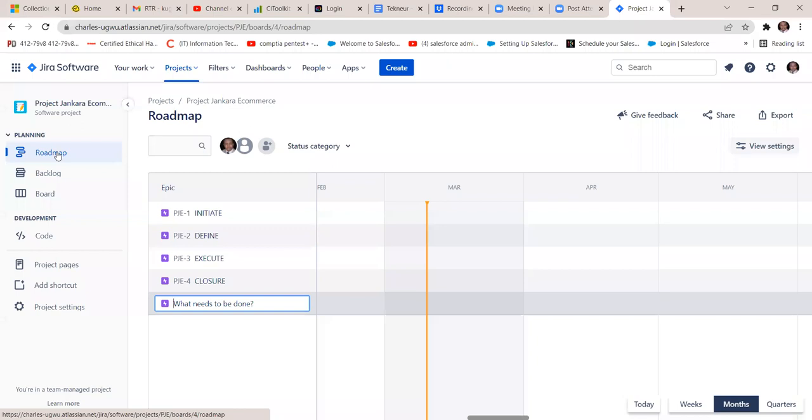One thing I want to address now is that epic must not be only initiate, define, and closure. It depends on the kind of projects you are working on. So epic in another project might be another thing. But on this particular project, I want us to use this work breakdown structure framework and continue with that till here so that you won't get confused. Even if it is another project, that's how you have to start planning your projects. So now we have created the epic list.